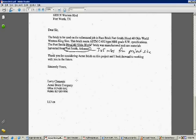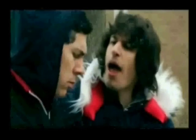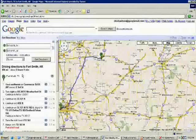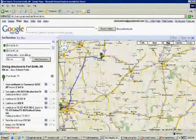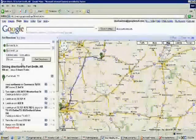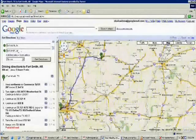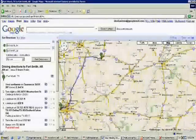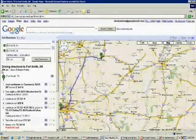Our project site is in Fort Worth, Texas, so now I go to Google Maps, click on Get Directions, type in Fort Worth, Texas as my point A and Fort Smith, Arkansas as my point B. As you can see here, it's 304 miles apart. That means I can claim this material as being regional and can put it on my regional materials submittal template.